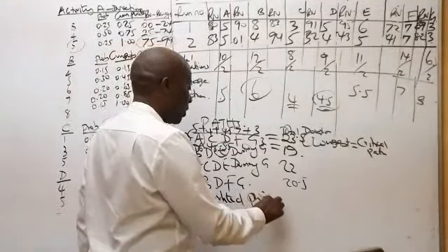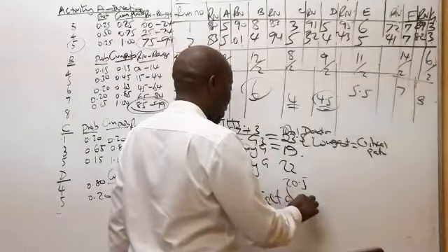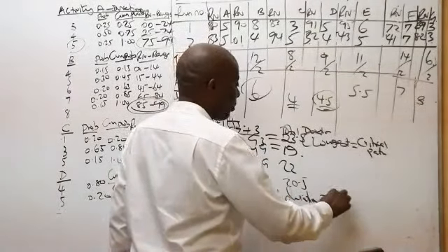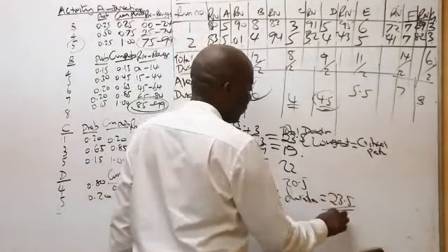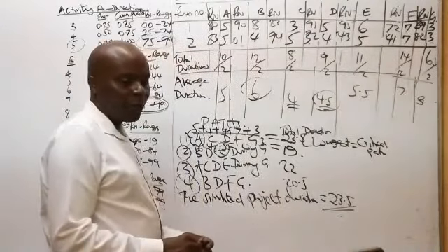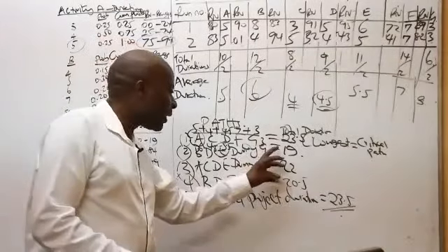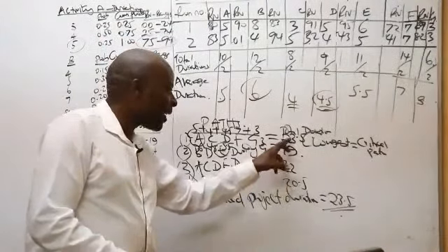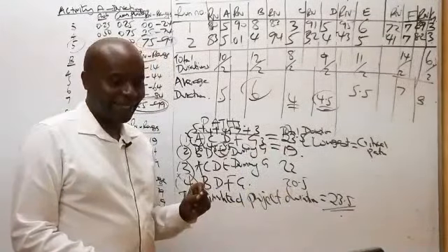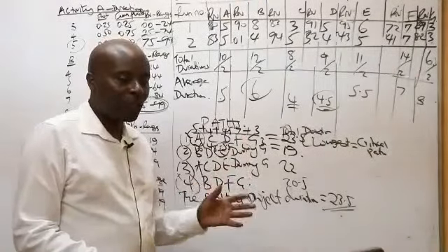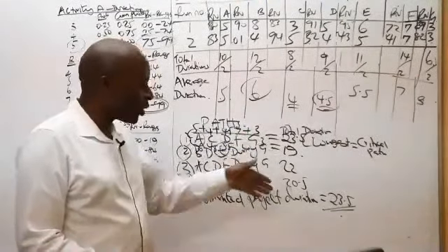The simulated project duration will be 23 what here, somebody? 23.5. At times we'll get other paths becoming bigger than this. So the critical path can change. That's why you must do a path analysis.